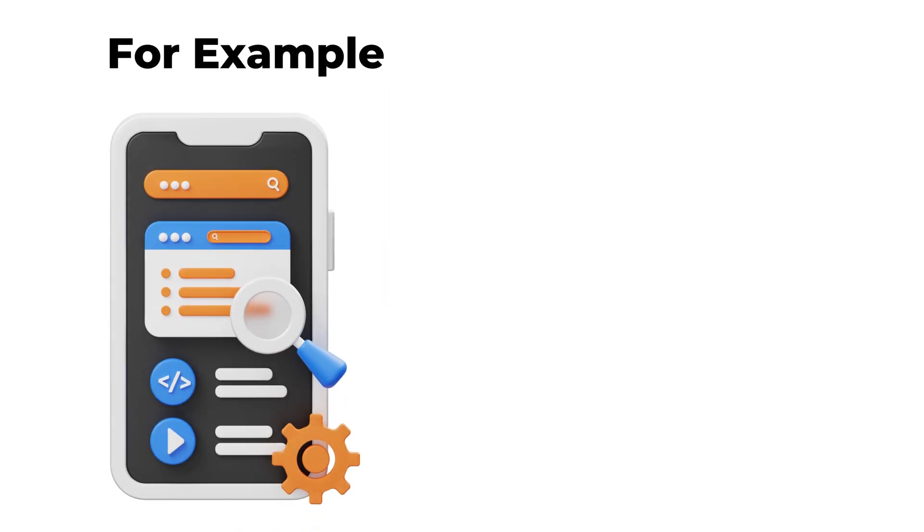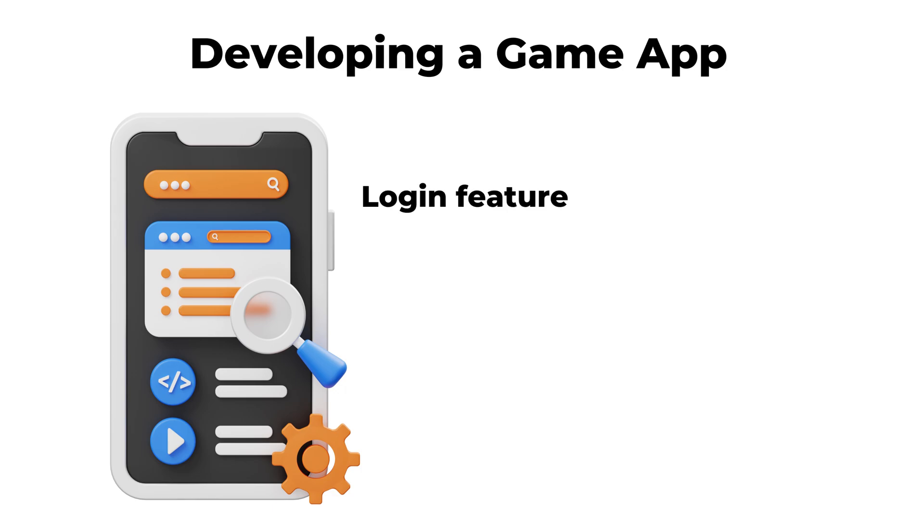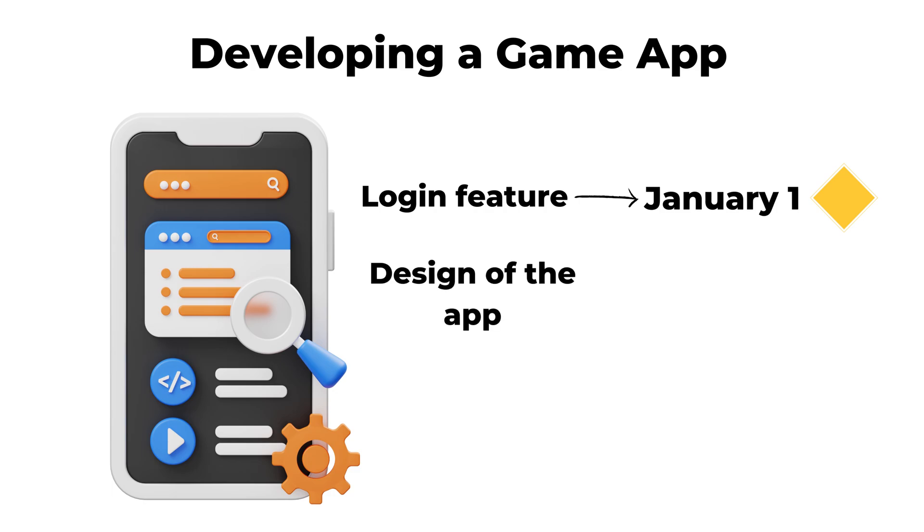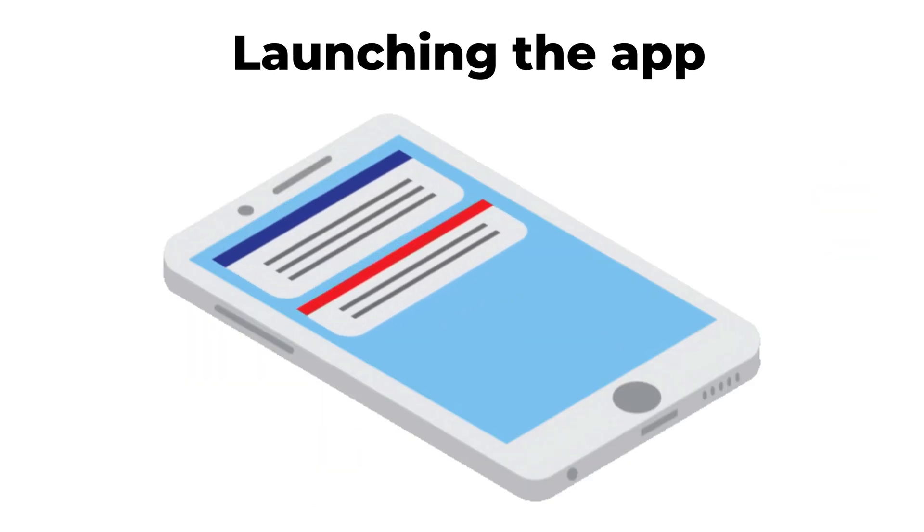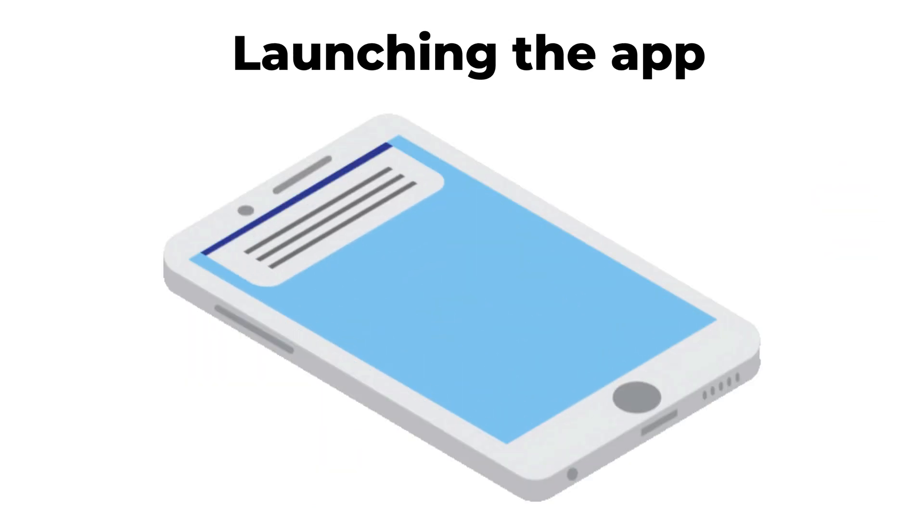For example, a mobile app company working on developing a game app may set completing the code of the login feature by the 1st of January as a milestone. Another milestone can be approving the design of the app by the 1st of March. These are two necessary steps toward completing the project of launching the app.